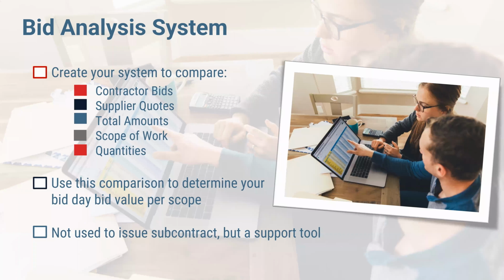So if you have two concrete people where one's 4.2 million and one's 4.25 million, how do you know either one of them has the right scope? Just because they got the same number or they're pretty close on that large of a concrete project doesn't mean they're right. So using a tool to develop that scope and give yourself some quantities allows you a quick check.